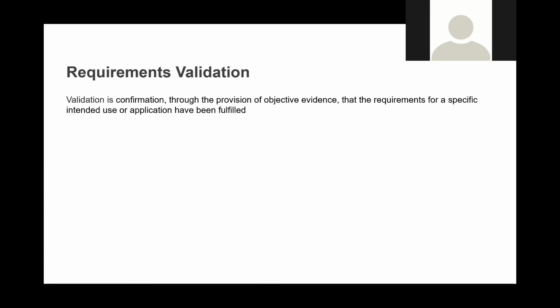Looking closely, verification is done mostly on design or at par on physical tests. But as soon as you go into the world of a final product, when you go to integration testing, when you go into a world of physical product being handed over, that's the validation phase where you say I have created this product and this is the final outcome.